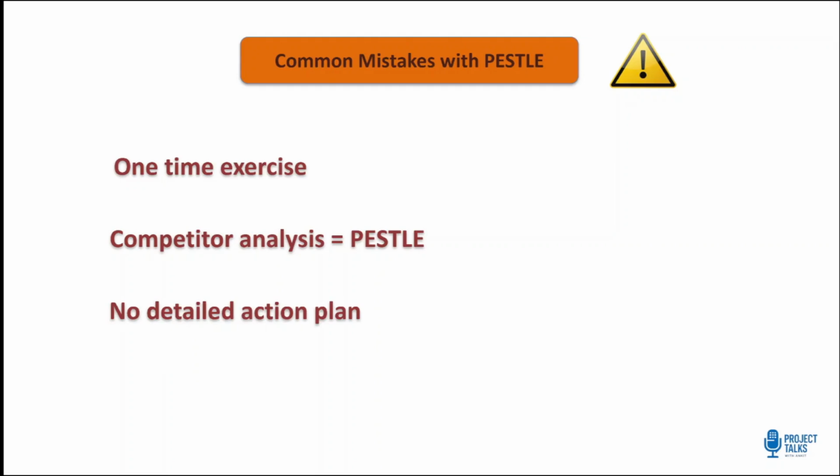Third, people often just list factors but never connect them with probability, impact, or an action plan. Remember the Excel that we saw, right? Now, without that, PESTLE becomes just theory. And finally, teams forget to revisit PESTLE when a big external shift happens, like a new law or a tech breakthrough. That's when PESTLE is most valuable.